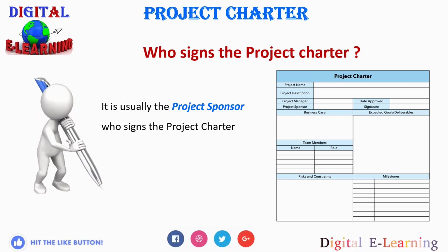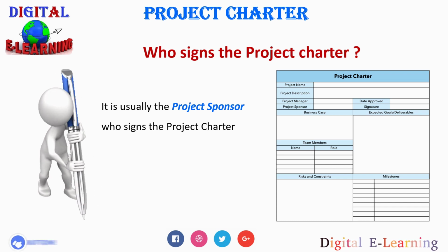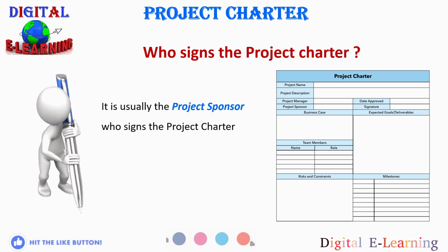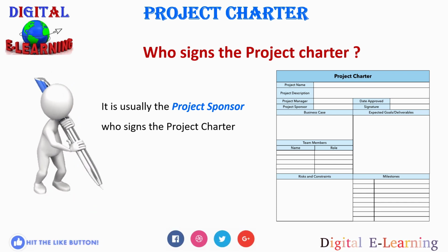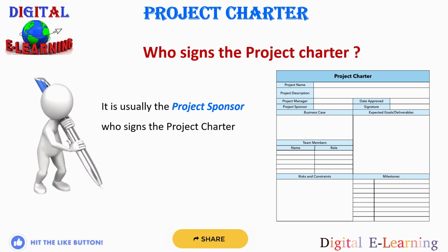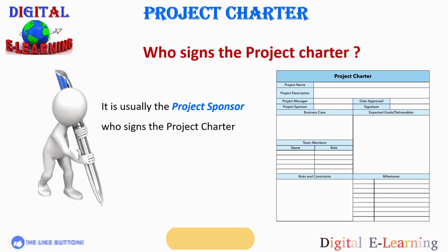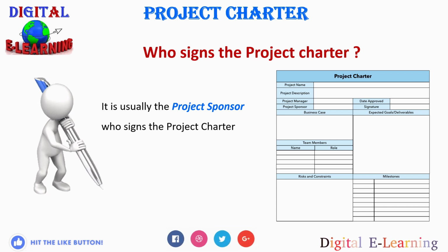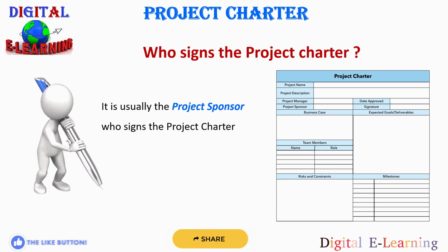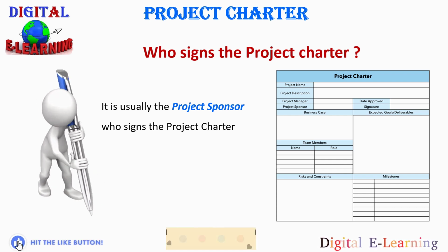Even though the project charter is a short document, it should not skimp on clarity and quality. The objective should be SMART: specific, measurable, achievable, realistic and time-bound. Don't start a project just to improve customer satisfaction, increase top-line revenue, increase sales, or build a better relationship with the customer. Such project objectives are very broad and open-ended. You will never know whether you have achieved the objective or not, and even if you believe you have, it is not necessary that your project sponsor or client will agree.